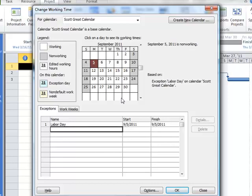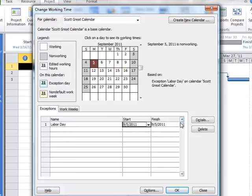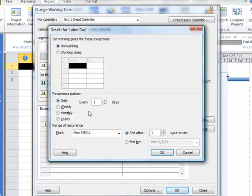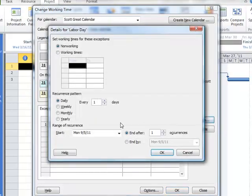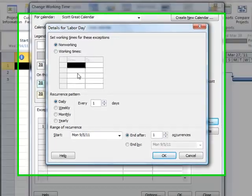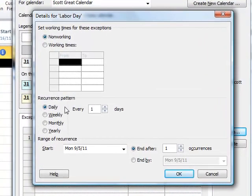So I could do this for every September from now until hundreds of years into the future if I'd like. But what's really cool about Labor Day is I know that Labor Days happen to occur on the first Mondays. So what I can do is actually come in here, and I'm going to change this to, by double-clicking on it, or going to Details either way, I'm going to change this to Reoccur.